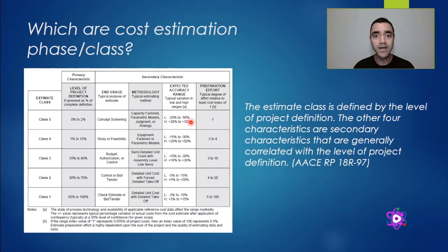If we are talking about a project whose cost estimate results in 100 currency, in the end the amount of money expended can be 50 currency or can be 200 currency, because this is the range of the cost estimation. The cost estimation engineer will define the level of accuracy for each cost estimation based on the information available.